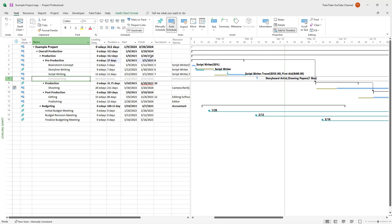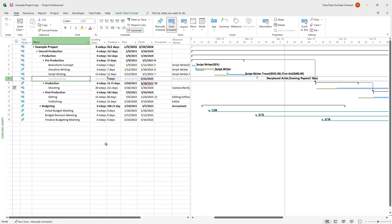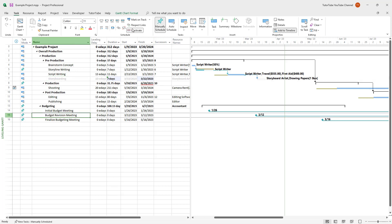As soon as I do this, you can see that the deadline changes for the overall main task. But you can see that this task is inactivated — you can still go and edit the dates as you like, even on an inactivated task. For example, if I don't want to do the budget revision meeting, I can just inactivate that as well, but the data is still there.